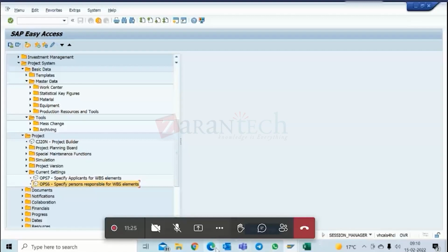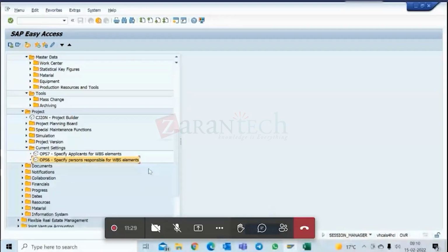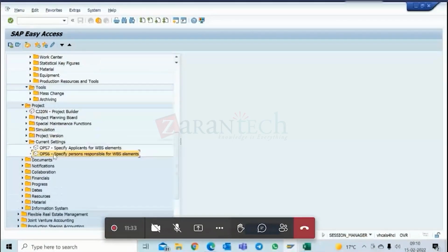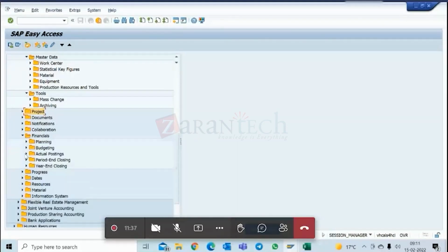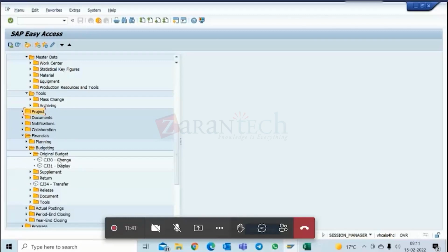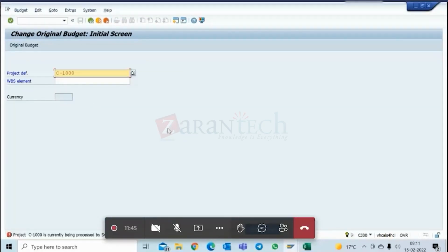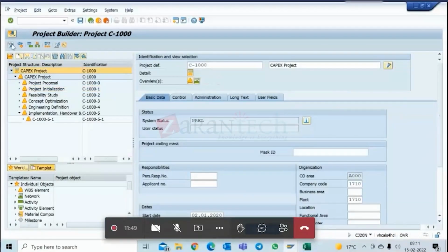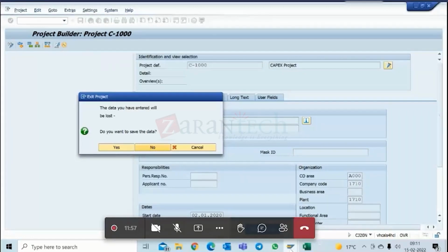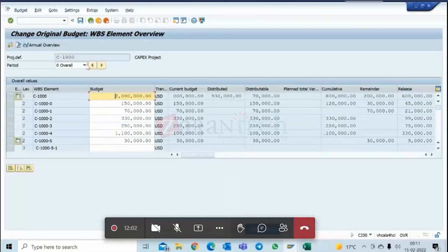Now let us go into the budget transactions. We saw budget first, then we saw budget release transactions. Within budget, we saw that you can do budget for overall or annual, or both. That setting is done in the budget profile. Like this is the overall budget, then we can have an annual budget. In some cases you can use both overall and annual, and in this case we are using both. On top of that, we saw how to do the distribution.